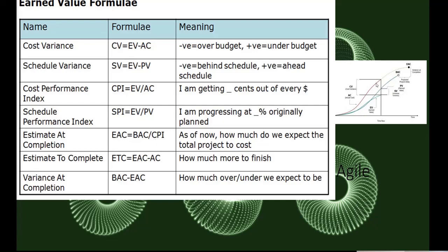If you are spending at 10% of the rate, and the budget is $3 million, you can expect how much the budget will be in the next 2 years, right? If it is going linearly, you can expect it. So this is the index term, CPI. You can calculate EAC based on the index, based on the slope. So it is BAC divided by CPI.